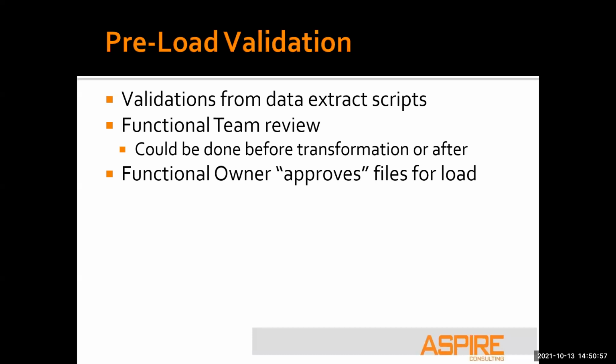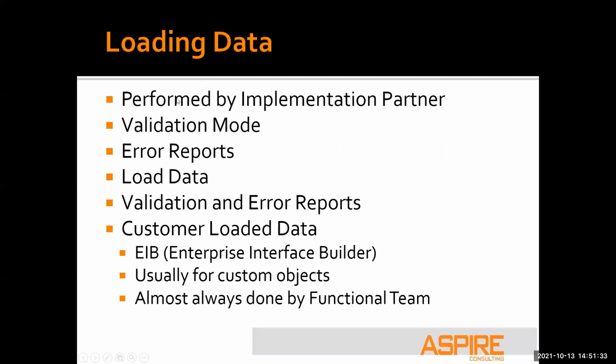load. And I always have a set date: I want you to sign off on this file by X date. So that way, I know you are going to look at it before then. And if there are any problems, then we deal with it before they get to a sign off. So this is just kind of a case-by-case basis on whether that fits into your project team or not. But I found that it really pulls the conversion team, the technical team together with the functional team and gets everybody on the same page. So that all happens pre-load.